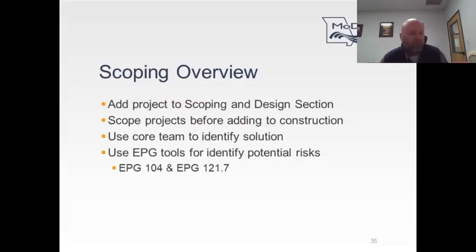Our goal is to have that scope up to preliminary plans if possible, and we want to be able to get there by using your core team to make sure that all the stakeholders that might be involved with that project are all on the same page and have a commitment to what that scope would be, so that it doesn't change after that commitment is made to the public. We do have a process that allows us to amend the STIP, but we want to minimize those amendments as much as possible, and this scoping phase is the best way to do that and start that early.